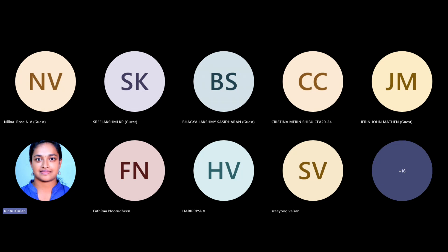And in RCC, when we look closely, the PCC part, that is excluding steel, the amount you're going to spend for 1 m cube of concrete is the same amount. If you take 1 m cube of RCC, the amount invested for materials to prepare 1 m cube of RCC is equivalent to the cost of steel required for 1 m cube of RCC.